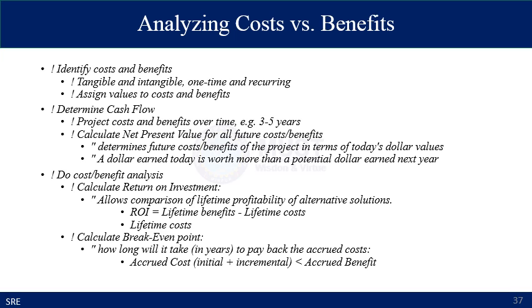Return on investment is calculated by lifetime benefits minus lifetime cost. So you have to calculate the break even point. How long will it take in years to pay back the accrued cost? Accrued costs are initial and incremental costs, and they must be less than the benefits of your project.